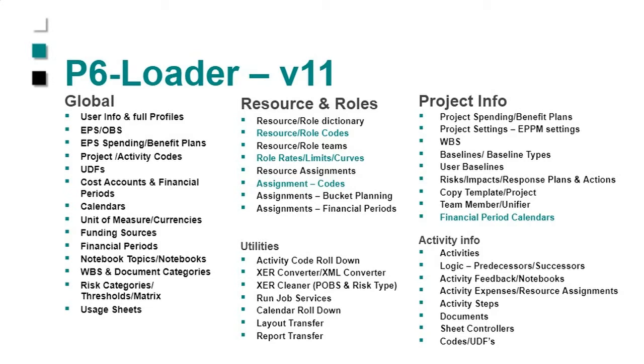You can run job services, so after you load all your data, you can reschedule or re-level. You can roll down calendars and activity codes from being global to being project to being EPS level, depending on which areas you're looking at. You can edit steps. You basically can do all of these different things within P6-Loader.